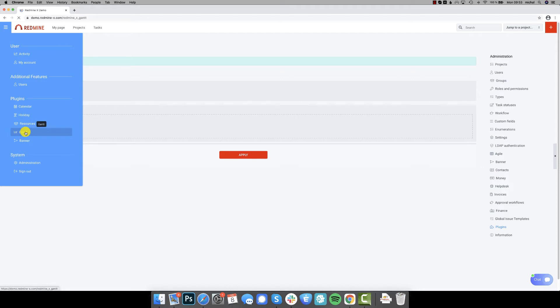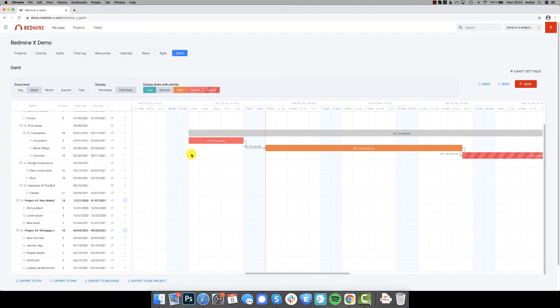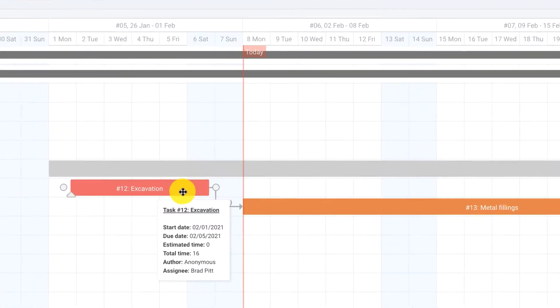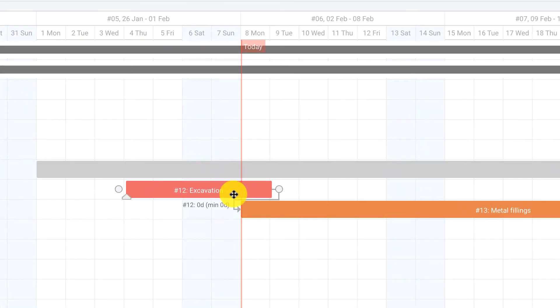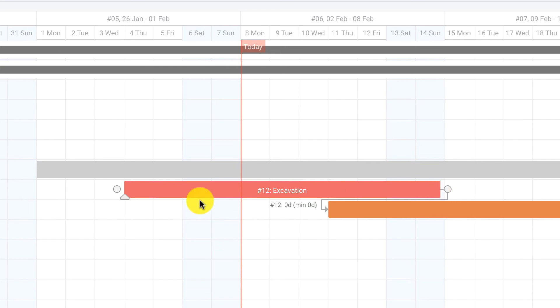You can access the global Gantt chart from the left menu. It is a place where you can see all the projects within the system, their tasks and milestones. You can easily update the task's position in time or change the due date.